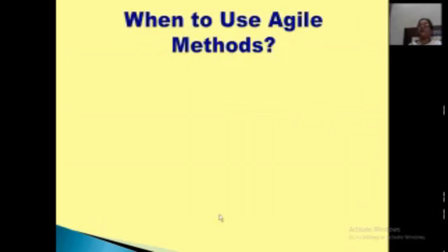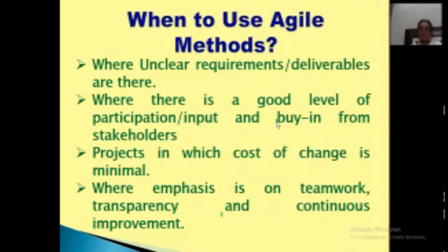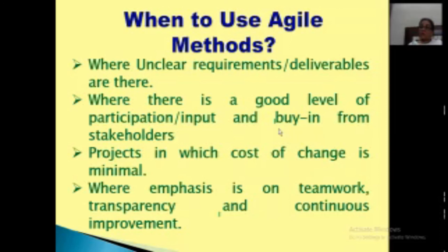When to use Agile methods: where requirements or deliverables are not clear and might change with the due course of time; where there is a good level of participation, input and buy-in from stakeholders - since Agile methods give major stress to people, interactions and team collaboration; projects in which the cost of change is minimal, because if incorporating change costs a very high amount that would lead to failure; and where emphasis is on teamwork, transparency and continuous improvement.